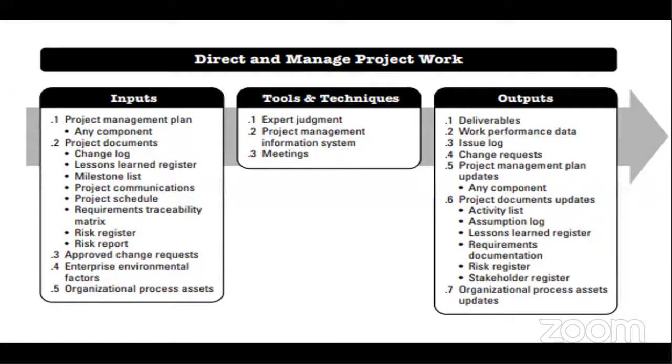Now, first things first, buying land is a phase. There are so many activities involved under that phase, but the deliverable we're expecting from securing the land is to have the land itself. Now, if you have the land, that does not mean that automatically the house is ready. So the land becomes a deliverable for the next phase, which could now be the planning of the building.